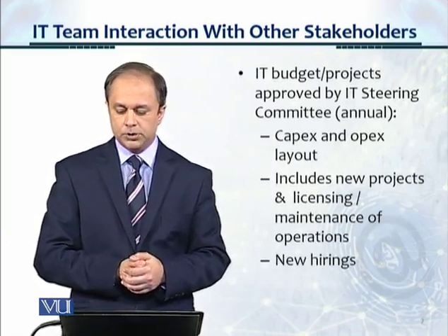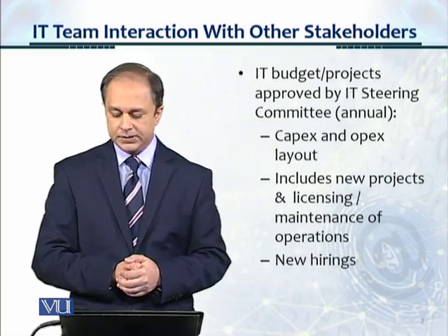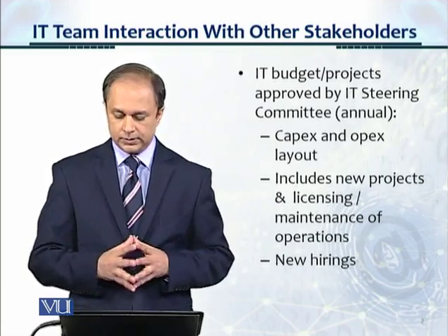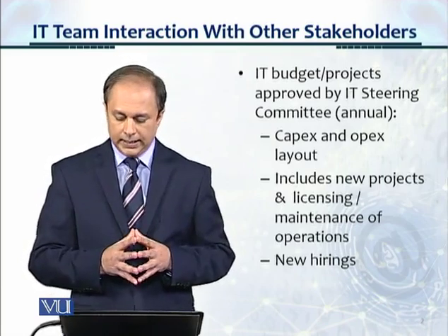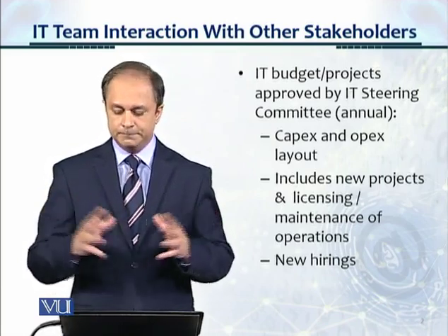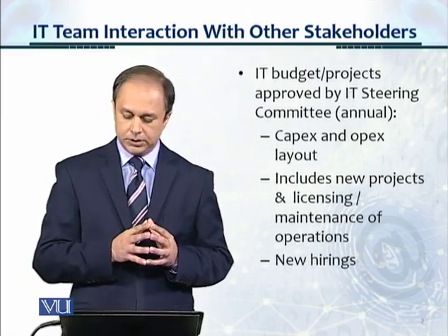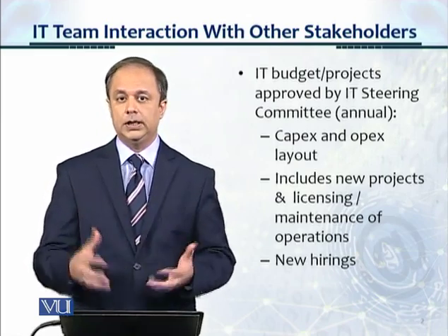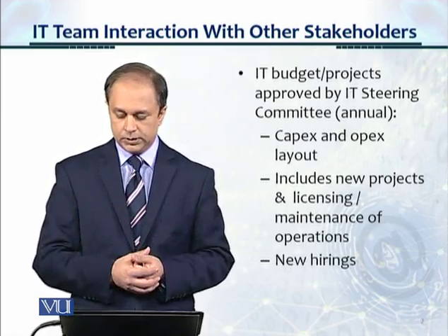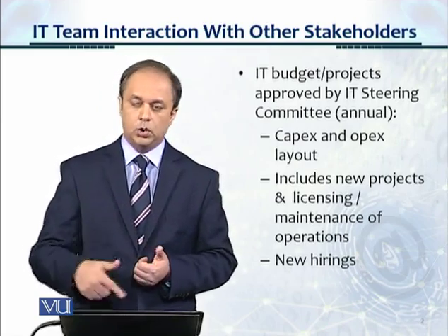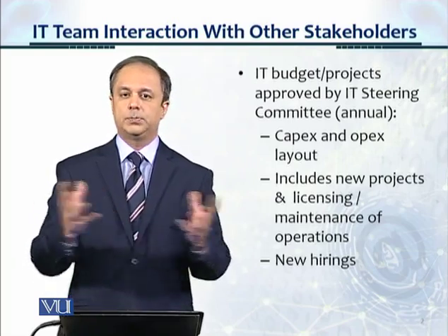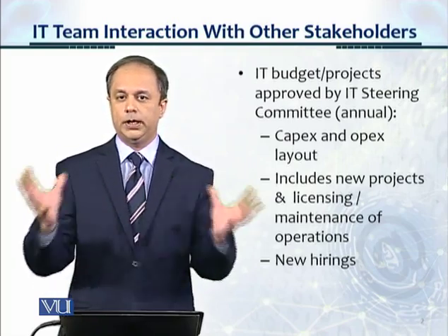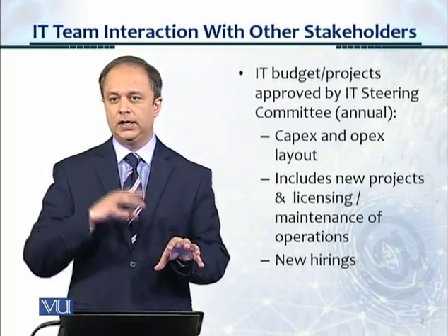So IT budget projects are approved by the IT steering committee, an annual process. There's a Capex and an Opex layout, and this includes new projects and licensing and maintenance of existing projects which are in operations, and then new hirings. So the IT has to go out once a year and has to lay out its budget, its requirements, and incorporating all the different projects existing and the new ones.